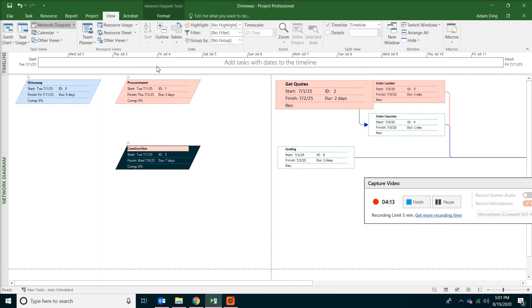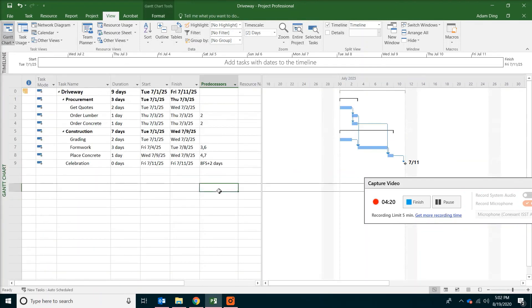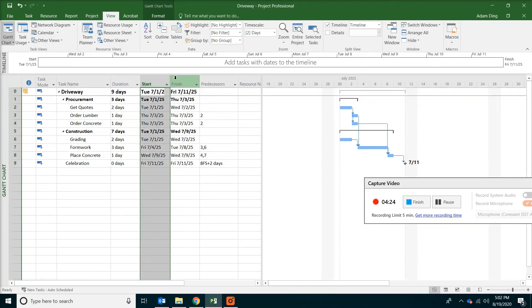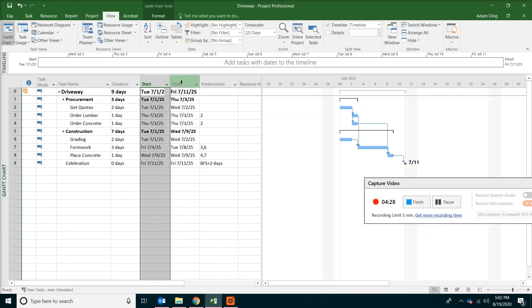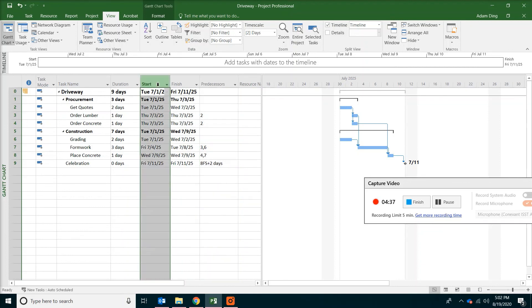Now go back to our Gantt chart view by clicking the button on top. Before we close, just want to remind everyone. Usually we don't touch those two columns for start or finish. Because your activity's start or finish date will be determined by the relationship. Not by the data entry.